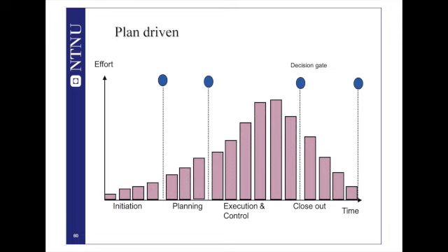Another characteristic of this plan-driven approach, as you can see, is that evaluation is done at the end of each stage, not during. It's difficult to make decisions during execution of one stage. So you wait until the end of the stage and then you make a decision, which means again, maybe the decision will come too late or too early. So this weakens your evaluation routines.